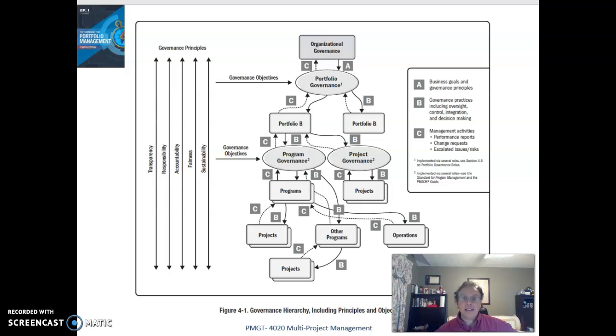Likewise, it's hard to measure the capacity of individual resources without taking into consideration a ton of factors, such as their availability. Are they going to be on PTO or leave during that project? What is their skill level? What education have they had? What training? And did that education or training turn into true capabilities? Personal maturity. Can that person be expected to work a 40-hour week, or are they going to lollygag? Working conditions. We've all had an experience with COVID the last 6 months, and we know in some cases the working conditions are not optimal. And then lastly, personal mindset. What other family issues, what other personal crises are impacting that person's ability to do work?